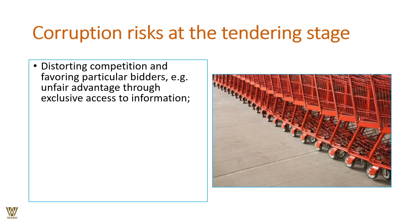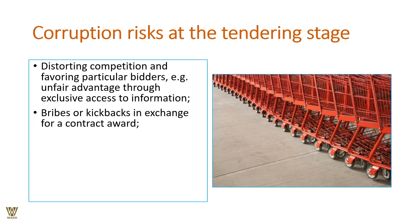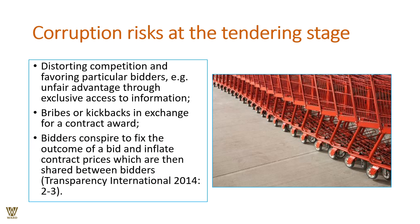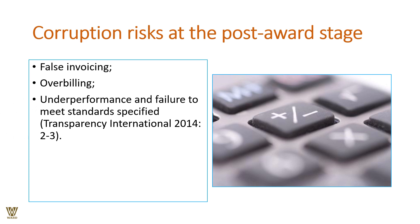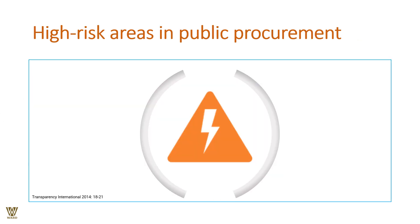At the tendering stage, corruption includes distortion of competition by favoring particular bidders — through bribery or kickbacks to reveal competitors' pricing. Bidders may also conspire to fix outcomes by colluding on their bids, which is wrong. At the post-award stage, the biggest risks include false or inflated invoicing, over-billing, under-performance, and failure to meet standards specified in the contract.